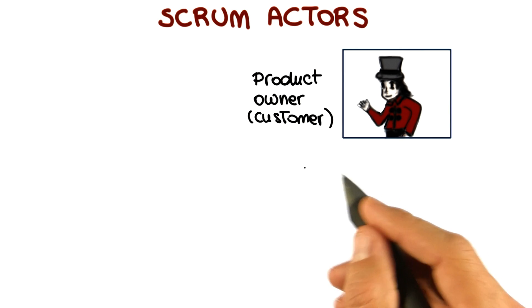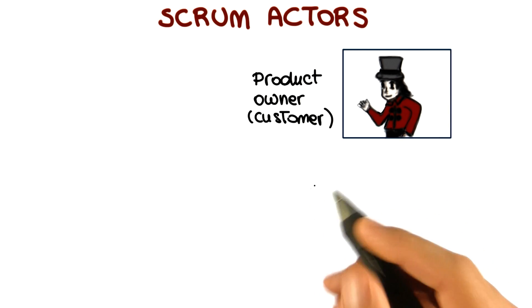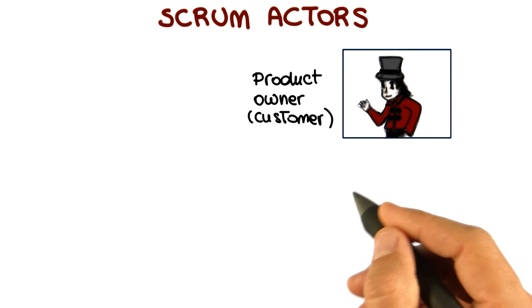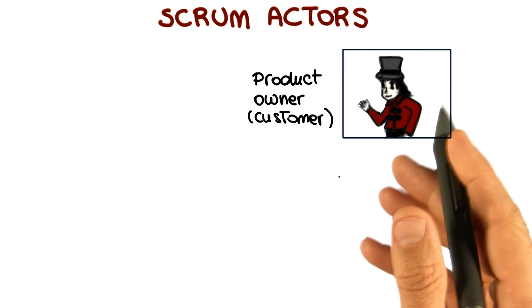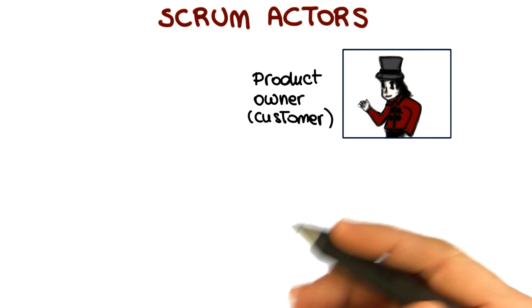What the product owner does is to clearly express these backlog items, and also to order them by value, so that they can be prioritized.